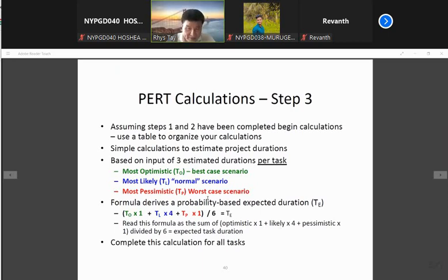All right. So we have a planner who does the planning of the project, and the planner will monitor every day through feedback from the project site engineer. So he will input the data using BIM, okay, or using Microsoft Project. They can roughly know what is the scenario of a project, right? So nowadays, it is very computerized, no need to memorize the formula or all these things, all automatically calculated for you, okay? So you complete the calculation, then you will know what is the likely project timeline to complete, okay?